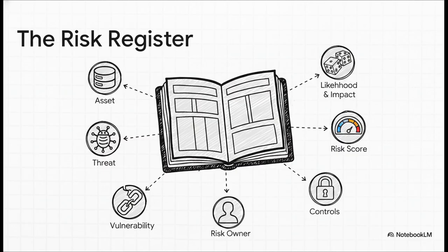Seriously, think of it like the master spreadsheet or the command center for everything related to risk. It captures every single detail, the asset, the threat, the vulnerability, the scores, the controls, and it even assigns an owner who is responsible for managing that risk. It is the absolute core practical tool.